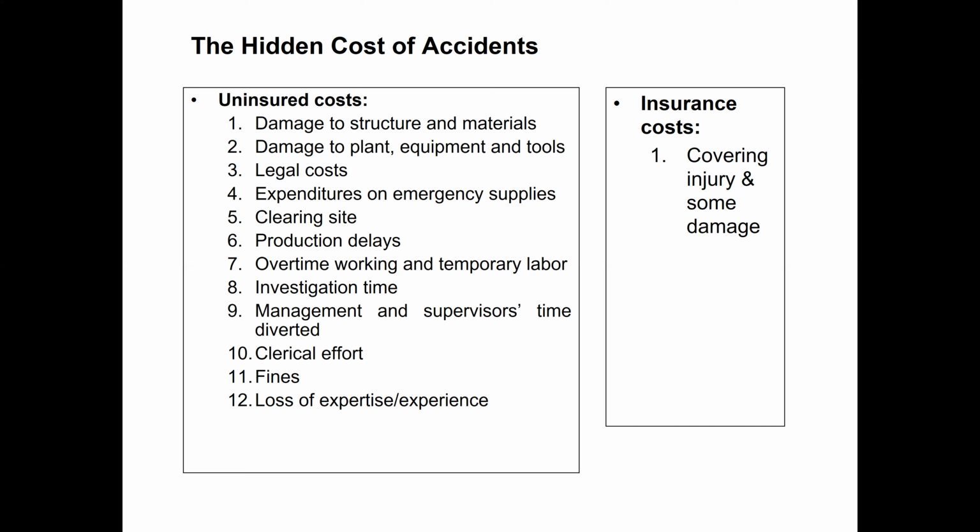So for this, when an accident happens, this is extra work. Then we have to bring another labor force, and we have to pay overtime to remove that debris and all this material from the site, and have to do the work again. So there is investigation time of the project manager and other team members to investigate that accident. Management and supervisor time is diverted due to this accident.